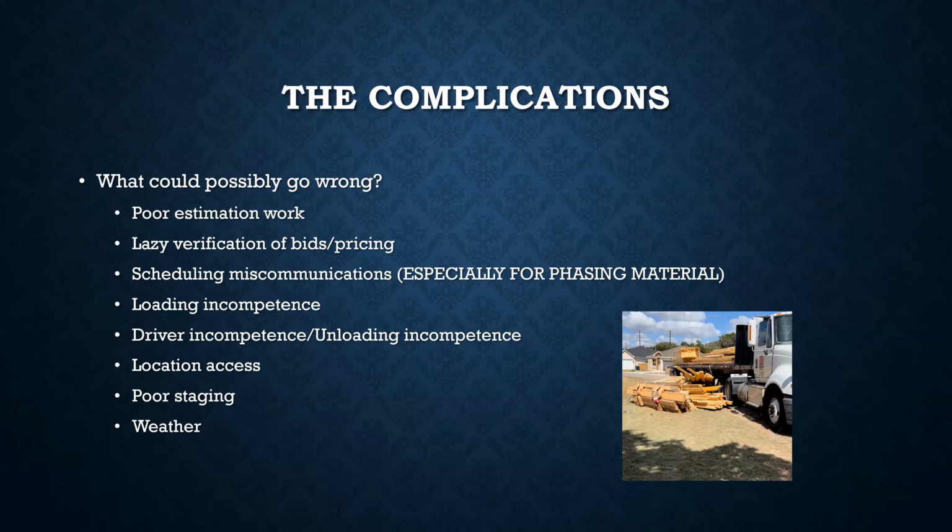Not good. What else? What can also be complicated is whoever's stacking this lumber, if they don't understand what they're doing, they might put all of your bottom plate, like first floor treated plate stock, at the bottom of your stack or something stupid like that. And they take the stack off, it's all bundled, fine, it's all good. But you have to move 80 pieces of lumber or whatever to get to the bottom of your stack to start building. You want things stacked in order so that they're on top, and that makes stuff make sense. So we'll talk about how to fix these things in the next slide.